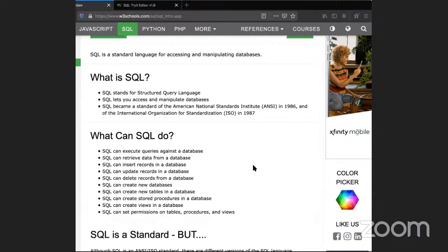Okay, so what makes up a very good user story are 5 things, but 4 things are really important. The goal, the role, the benefit, and then the acceptance criteria are the 4 important. I wouldn't say optional, but optional-ish is the additional information. So a good user story must have a role, a goal, a benefit, an acceptance criteria, and additional information.